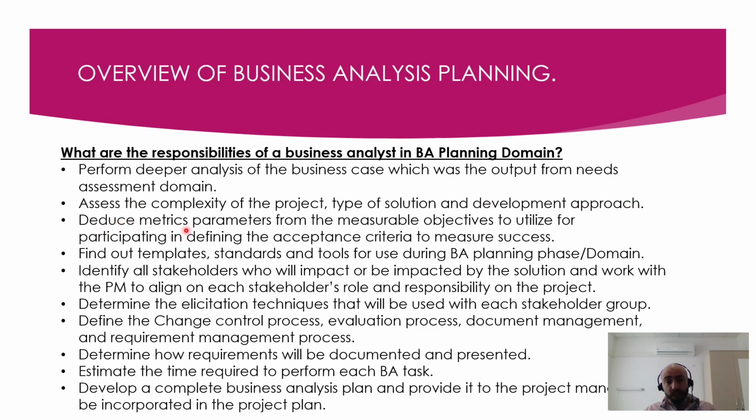The business analyst will deduce metrics, parameters from the measurable objectives to utilize for participating in defining the acceptance criteria to measure success. Okay, without acceptance criteria, again, that is a key concept which we're going to discuss mainly, and this is in planning. So that definition of the acceptance criteria happens in planning, and that is mainly an indicator that measures success.